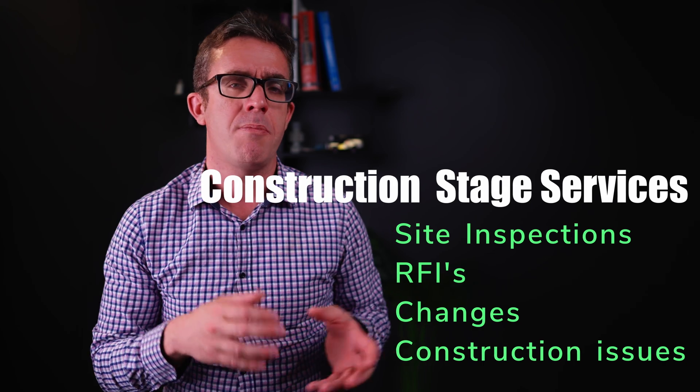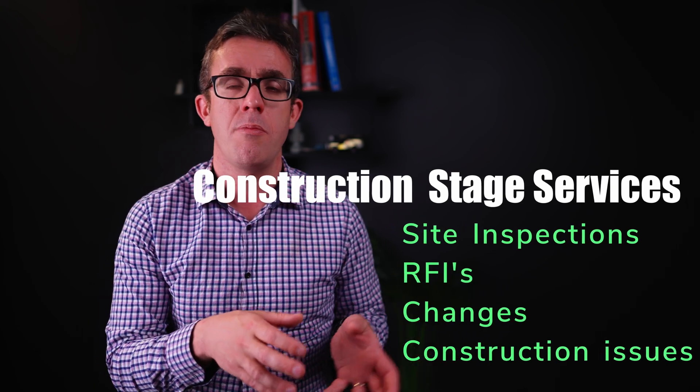Obviously, then the building is getting built, so then you have your construction stage services. Depending on what the deliverables are, the scope in each one of these will slightly change. Now with the way BIM is going ahead, there's a lot of front-end modeling that you need to do to better produce those BIM models. So now, those earlier stages need to have higher fees than what you traditionally used to have, where back in the day your peak level of documentation was at that construction stage. That's typically where you'd get your most amount of money.